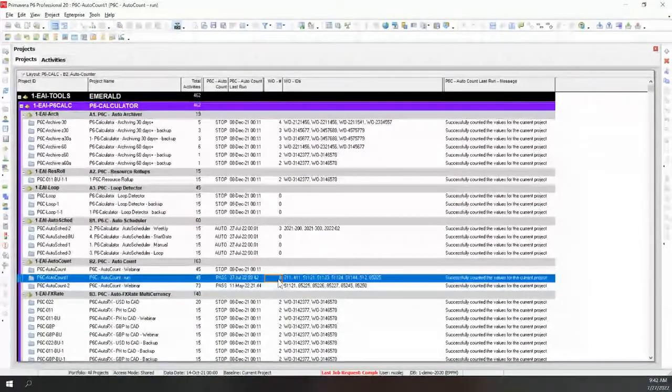Most clients don't use a notebook, but you could have a notebook at what day you ran what and how many there were. So you can have different statistics. Okay, so we've got a lot of different flavors. But this kind of thing we do a lot of, counting a variety of things. So activities started and stopped, or started this week, completed this week, in progress this week, work orders in progress, work orders added, you name it, we count it, and this is how simple it is.